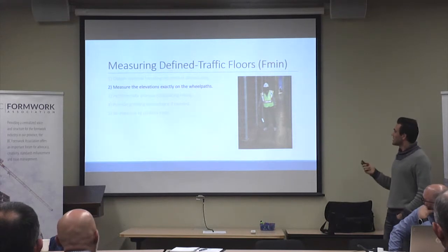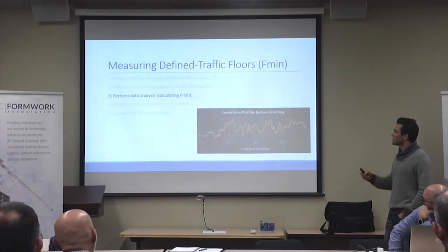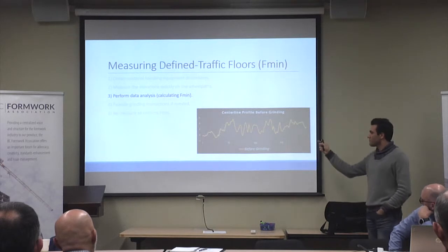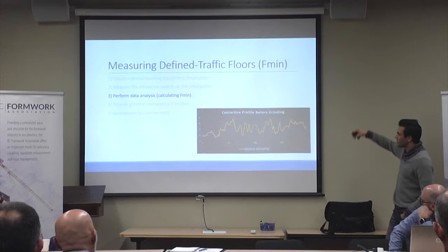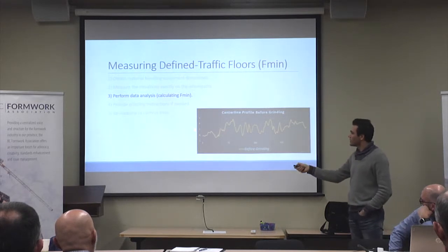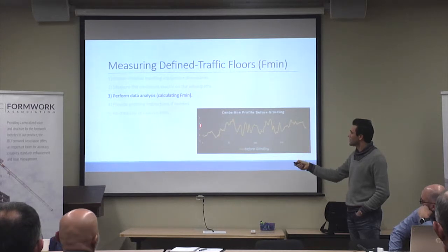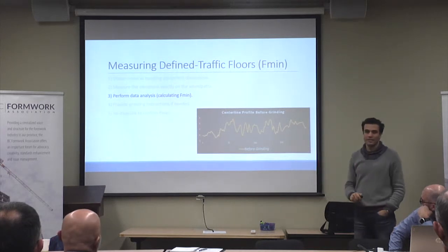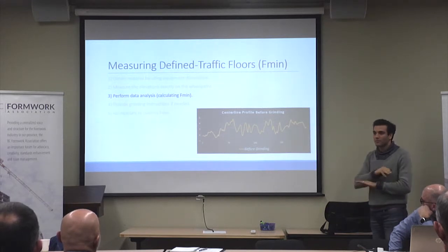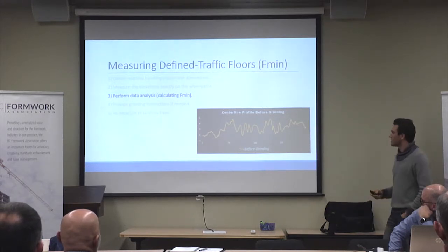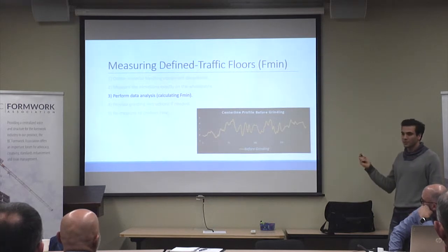Basically, and then we perform the data analysis. For example, this is one of the runs. So don't look at how much it goes up and down, but look at how good of a slab it is. At the worst, from the very minimum to the maximum is within 6-7 millimeters. So we're talking about something fairly good, but it was still not good enough for this purpose.